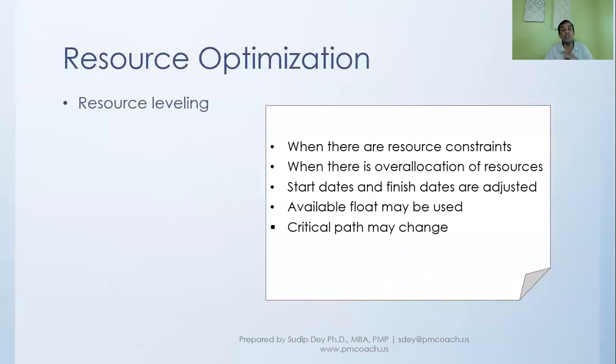And when we are doing this adjustment, and we use the resource leveling technique in the resource optimization, we can change the critical path, we can change the dates, and of course we'll try to use the float by moving around the activities.